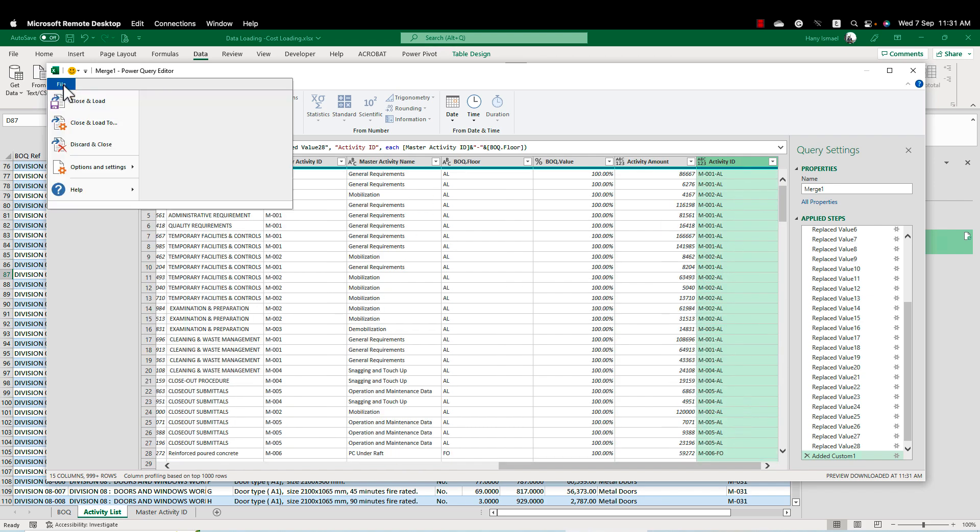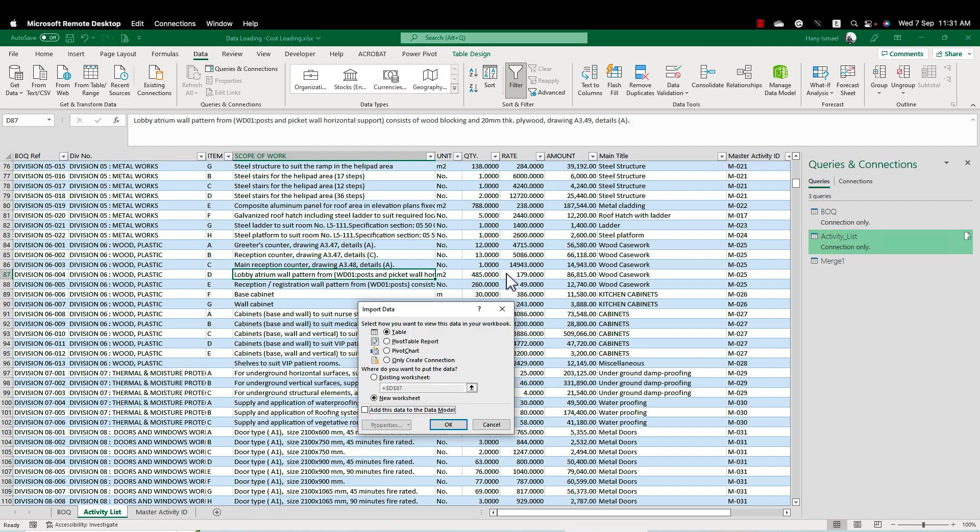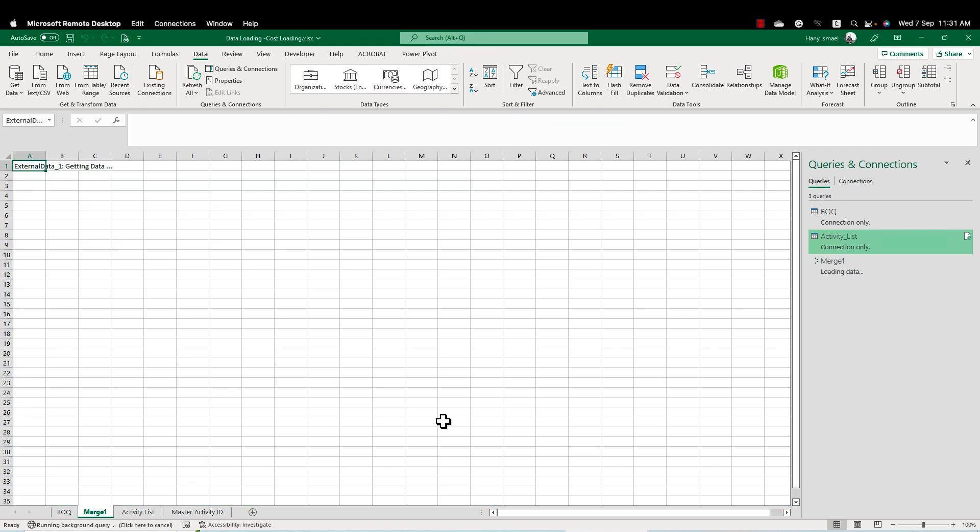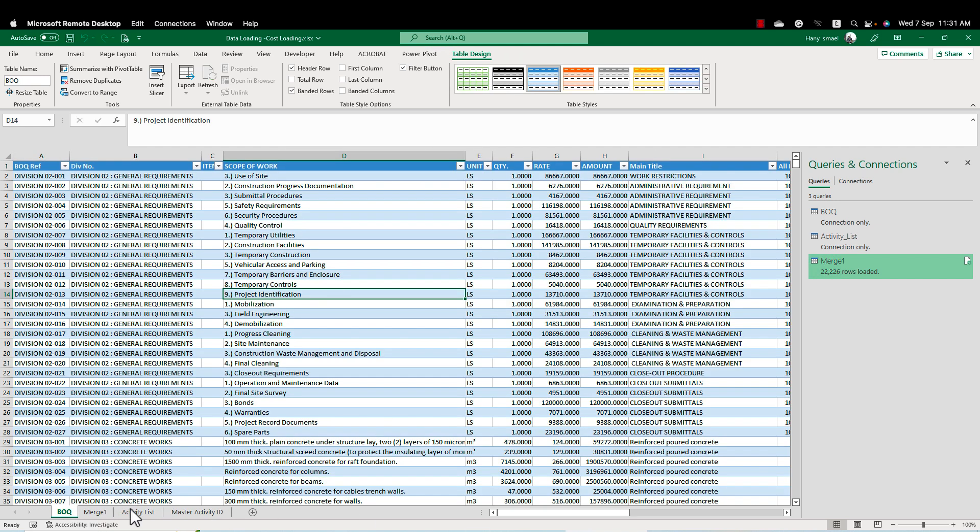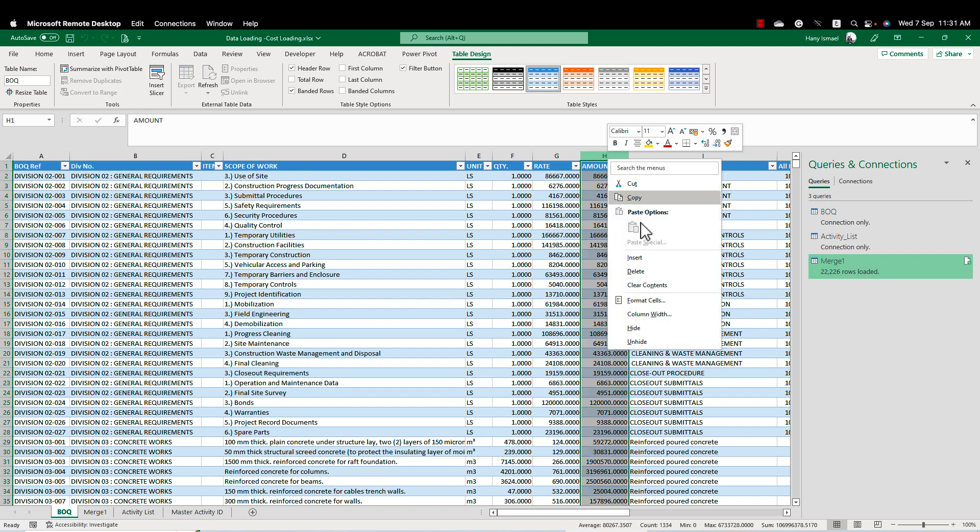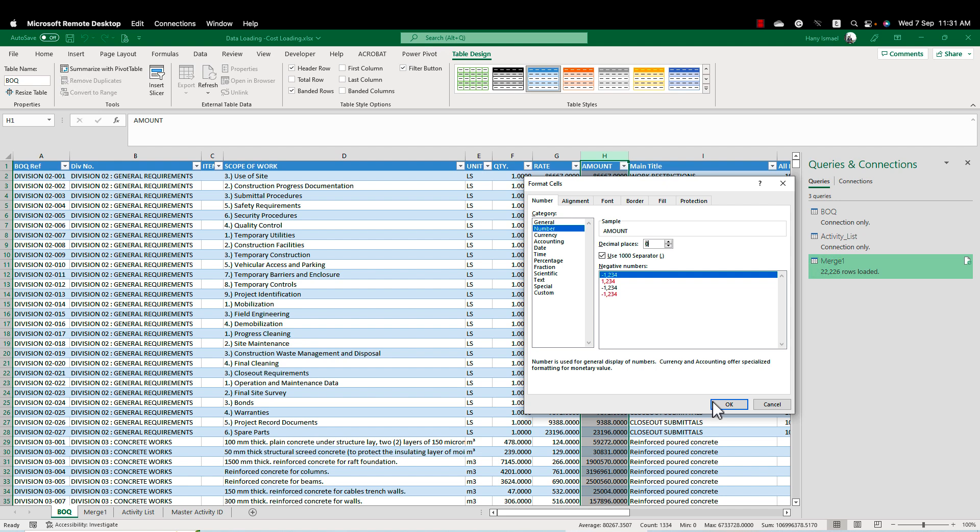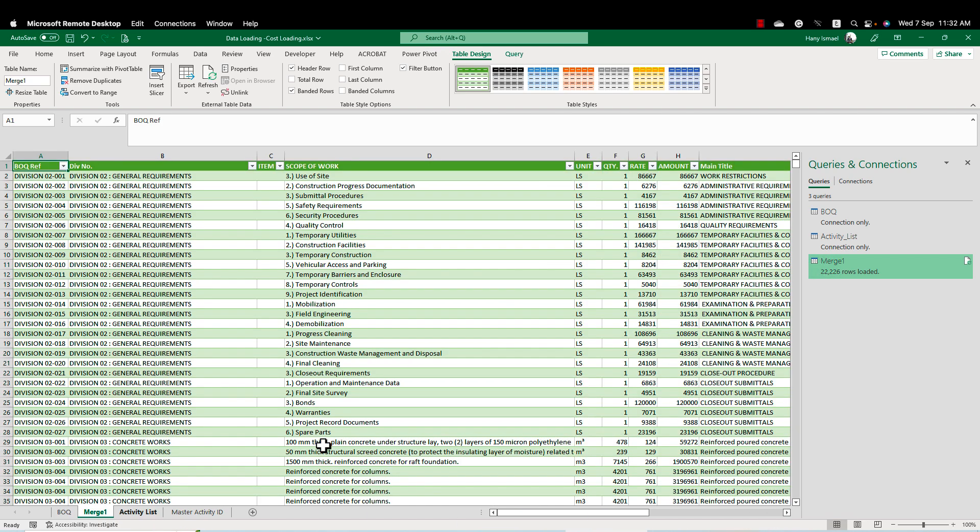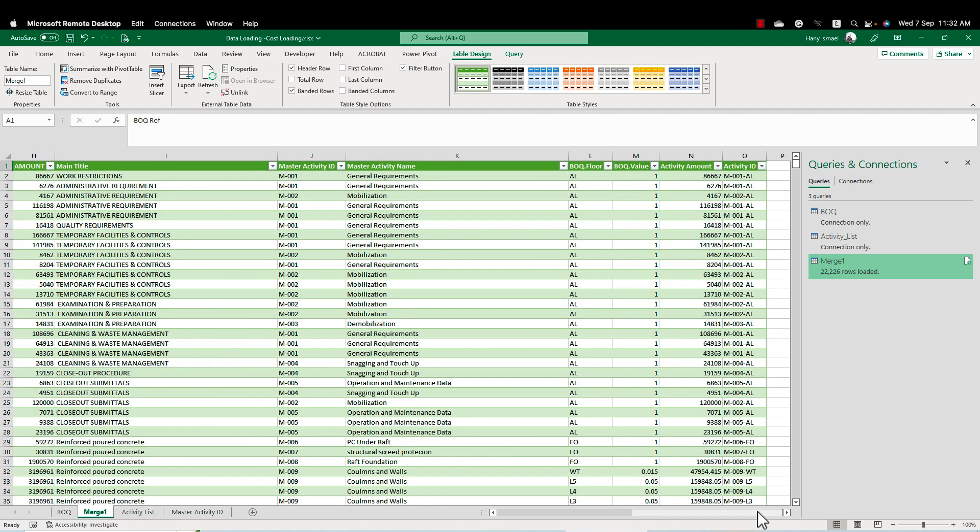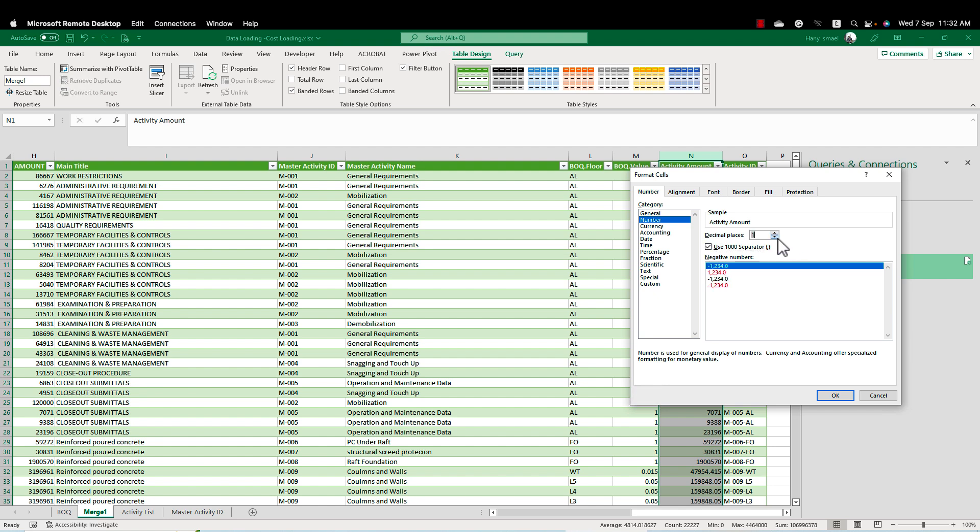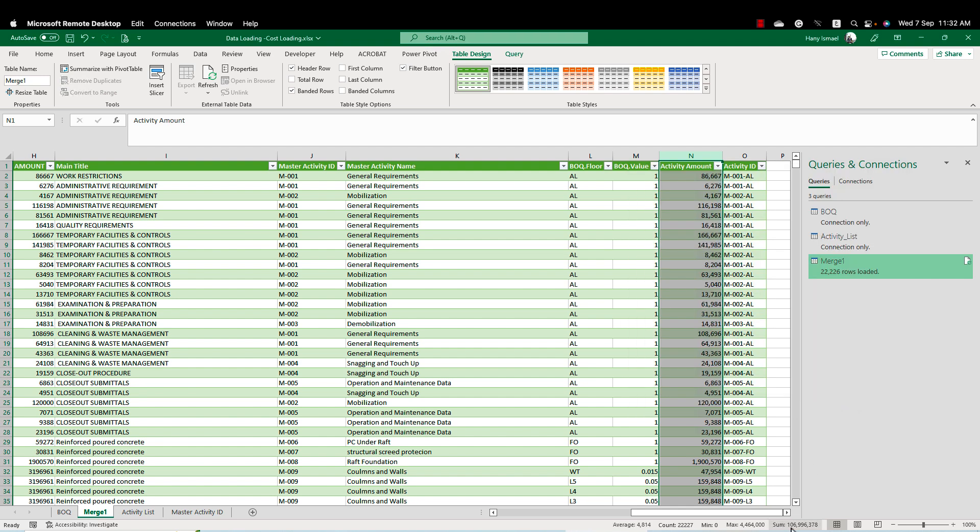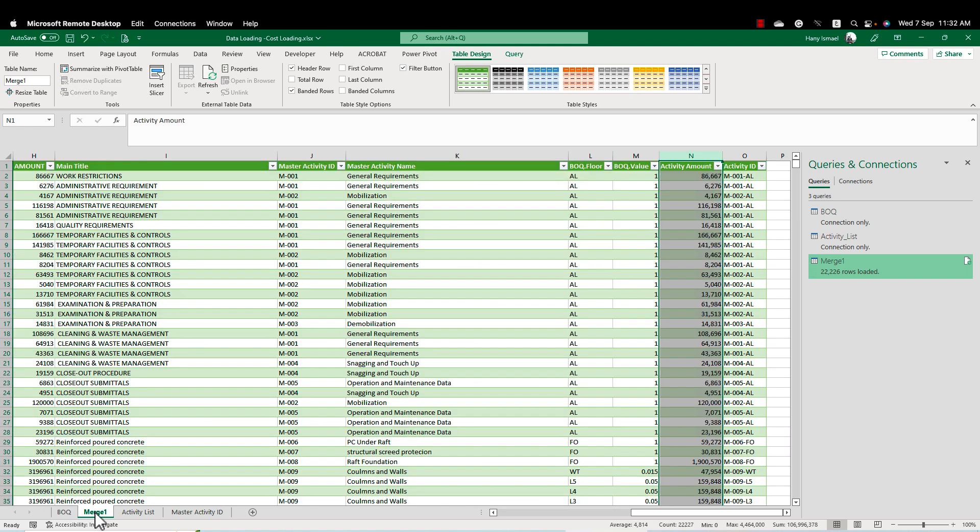In that case I'm going to file, close and load to. And I'm going to make it in a new worksheet so I can see the data. And this is my nice table. Now I need to do one check. I have here, this is my BOQ, the amount of the BOQ. We have here 106,996,379. Now I need to check that the activity amount is the same. 106,996,378 which is OK. This is one dollar or dirham or Saudi real only, no, not a big deal because of fraction.